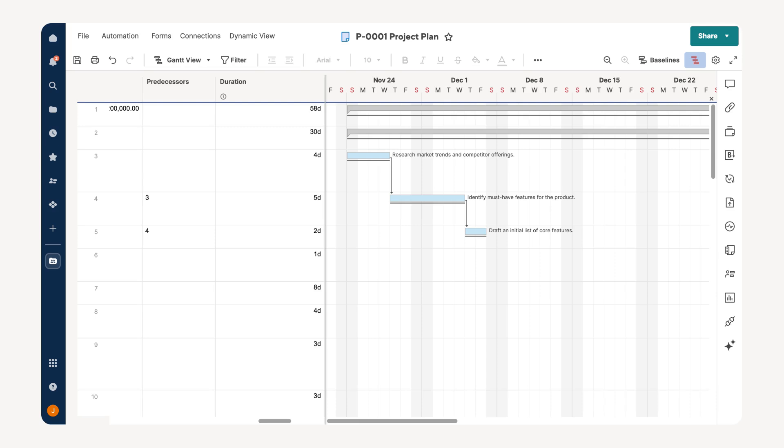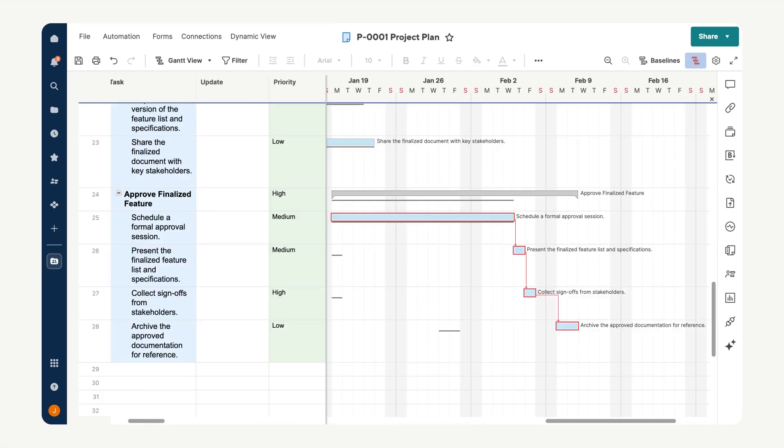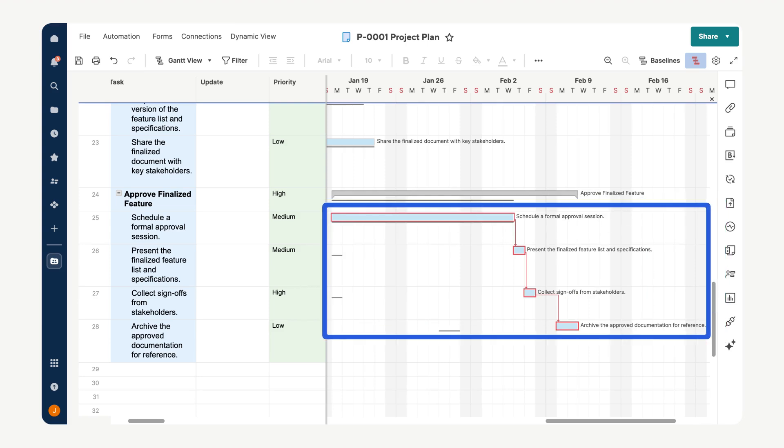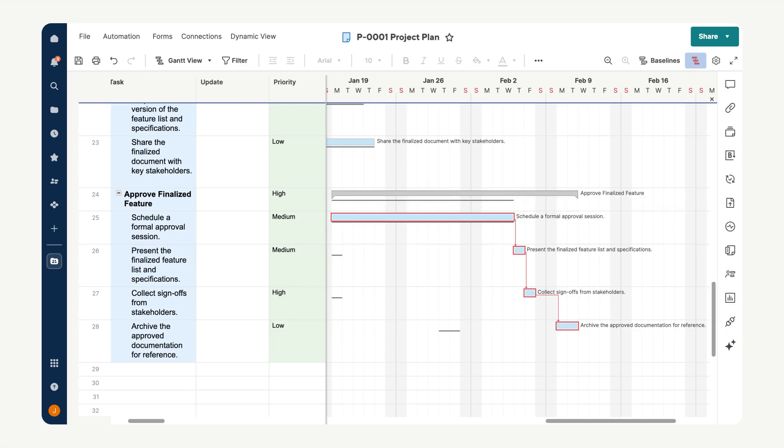The critical path highlights the tasks that directly affect your project's completion date. Select show critical path from the toolbar while in Gantt view to identify these tasks. The tasks that must be completed on time to prevent delays in the overall schedule will then be highlighted in red. Regularly monitor these tasks to ensure your project remains on track, focusing your efforts where they matter most.